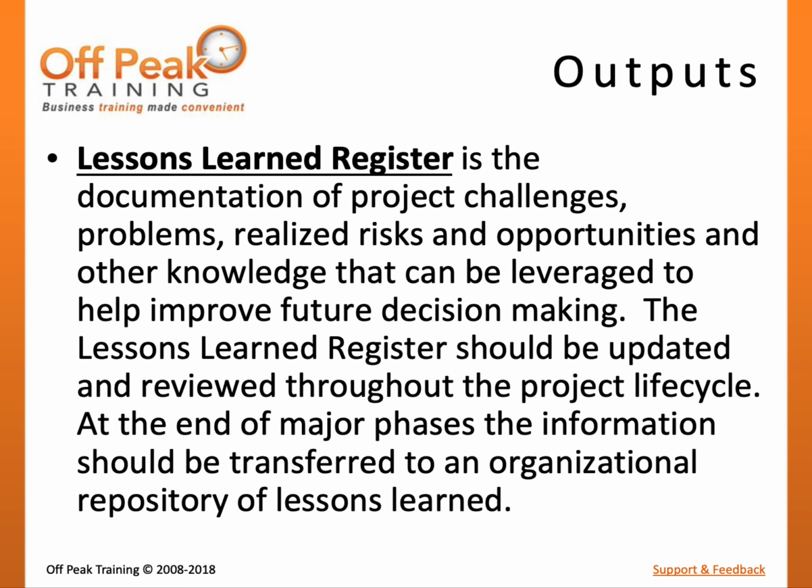The primary output is the Lessons Learned Register, documentation of project challenges, problems, realized risks and opportunities, and other knowledge that can be leveraged to help improve future decision-making. The Lessons Learned Register should be updated and reviewed throughout the project lifecycle. At the end of major project phases, the information should be transferred to an organizational repository of lessons learned.